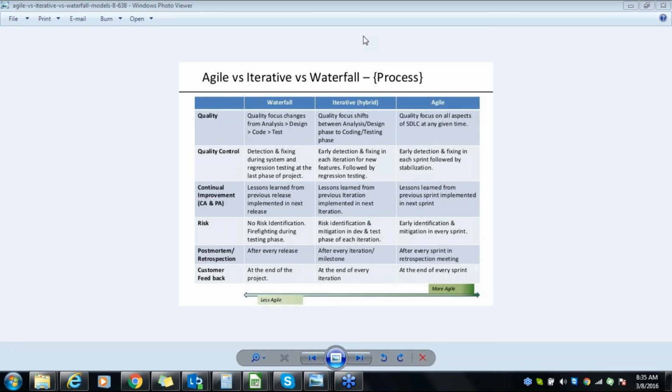Now, what happens while developing this product? ICICI Bank has split this into three parts: first we will do it for the same bank, then for other banks, and then for IMPS. So this is how they define the entire product into three different sprints.